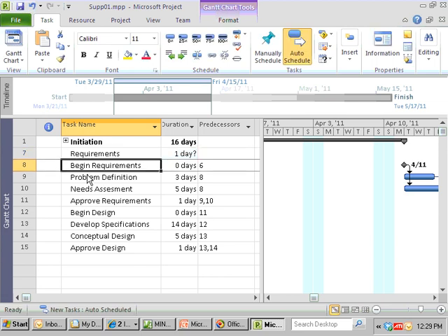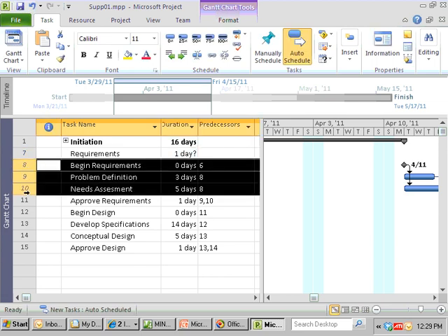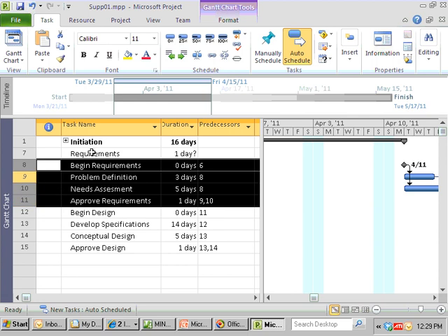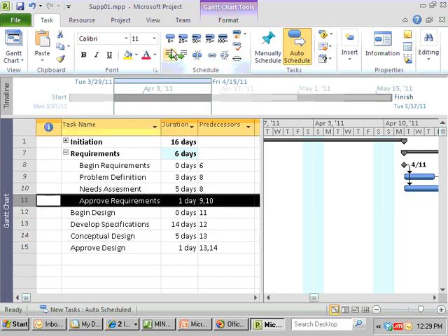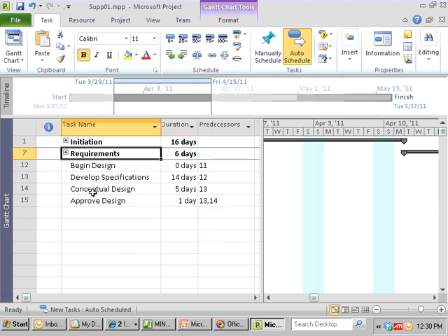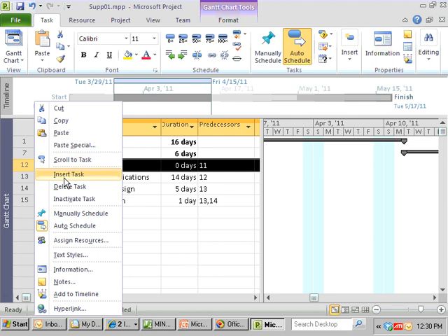And the way Project Manager understands is anything that's indented underneath something else is really a subtask. So now make sure you're on the Task tab and indent, so it understands, oh, everything you've indented under here is part of it. If you make a mistake and say, oh gosh, I included something that I didn't need to include, if you back out, you'll see it's no longer part of the thing. Oh, but I was right the first time, indent it, and it is part of the thing. Okay, and so a handy thing,